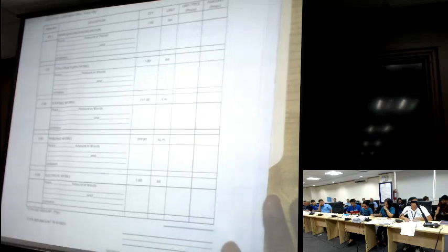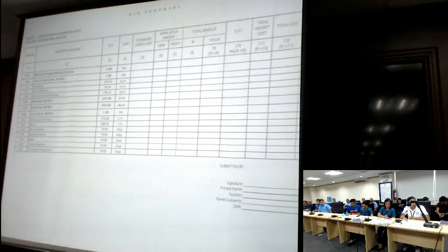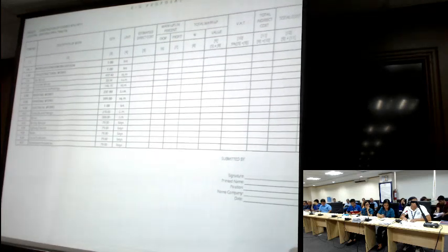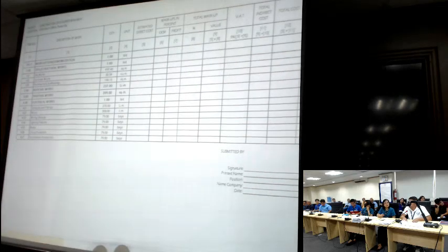Scope of works. Under civil structural works, we have the site works, covering 497.40 square meters, concrete works 33.54 cubic meters, and formworks and scaffoldings 146.15 square meters. And we have item number 2, the roofing works, 237 linear meters covering the whole walkway, and the painting works 399 square meters. And under electrical works, conduit and fittings 270 linear meters, wires 300 linear meters, wiring devices, lighting fixtures, boxes, circuit protection and terminal accessories. The project covers 79 days for the covered walkway.